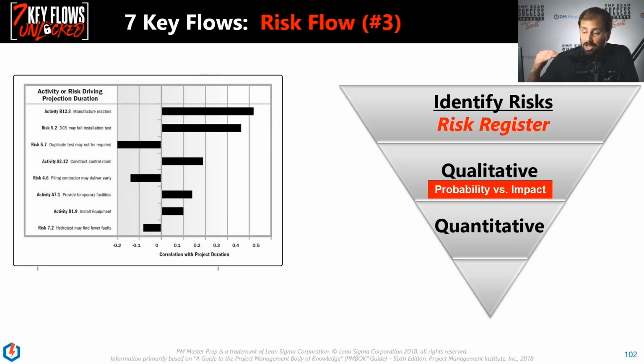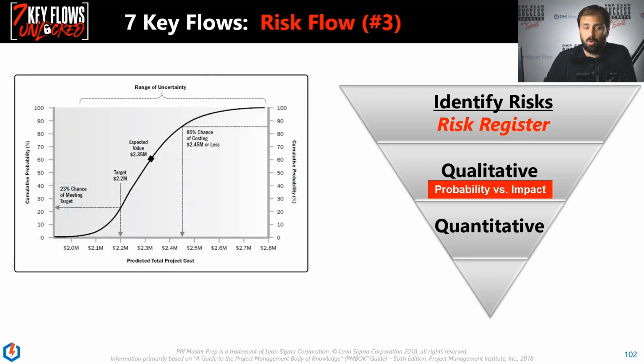That's where each one of these risks is ranked by the amount of correlation or relationship it has to producing an output. Like at the bottom here, it's duration. So the schedule link. Like if some of these things happen, our schedule might go really bad, or it might not go so bad. Whatever it is, we're going to understand that here, okay? Now, that's for the individual risks that we keep our eyes on. This is what we're getting.